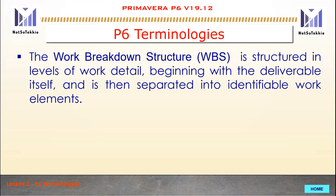The next one is the Work Breakdown Structure, which is structured in levels of work, beginning with the deliverable itself and then separated into identifiable work elements. For example, we have Land Development Works and Housing. Under Housing, there are Earthworks, Architectural Works, and Electrical Works. Under Land Development, there are Site Preparation, Road Works, Drainage Works, Sewer Lines, and Site Development or Sewage Treatment Plant. These are examples of the WBS.